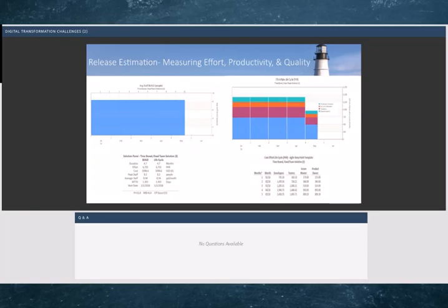So this is an example of how we would use multiple metrics to figure out how we're going to deal with the continuous integration. If I look to my left here, I can see an estimate. This is for staffing. You can see the blue there, staffing profile. It's telling us we're going to deliver this particular release within the transformation within 10 sprints. With 10 sprints, it's going to take about 4.7 months. It's going to cost a little over $1 million, with 8 people.